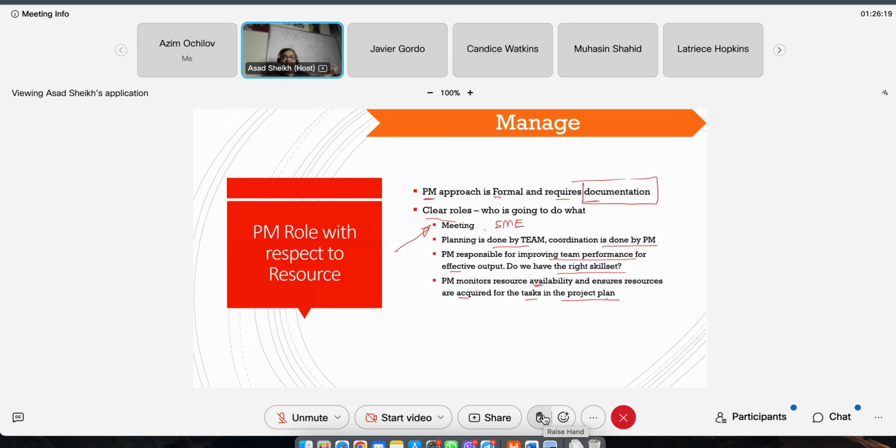So, like I said, the team members, you're going to get them at either one FTE, full-time equivalent, like 40 hours a week, or you may get them at 0.25 FTE, or maybe 8 hours a week. So whatever the case may be, you've got to make sure that they are available, they are working, and they're doing the work. And if they are not available, you should know when they're not available. In other words, if they are on PTO, paid time off, or time off from work that week, you should know that. So you should give them a heads up, and that information should be in the team charter.